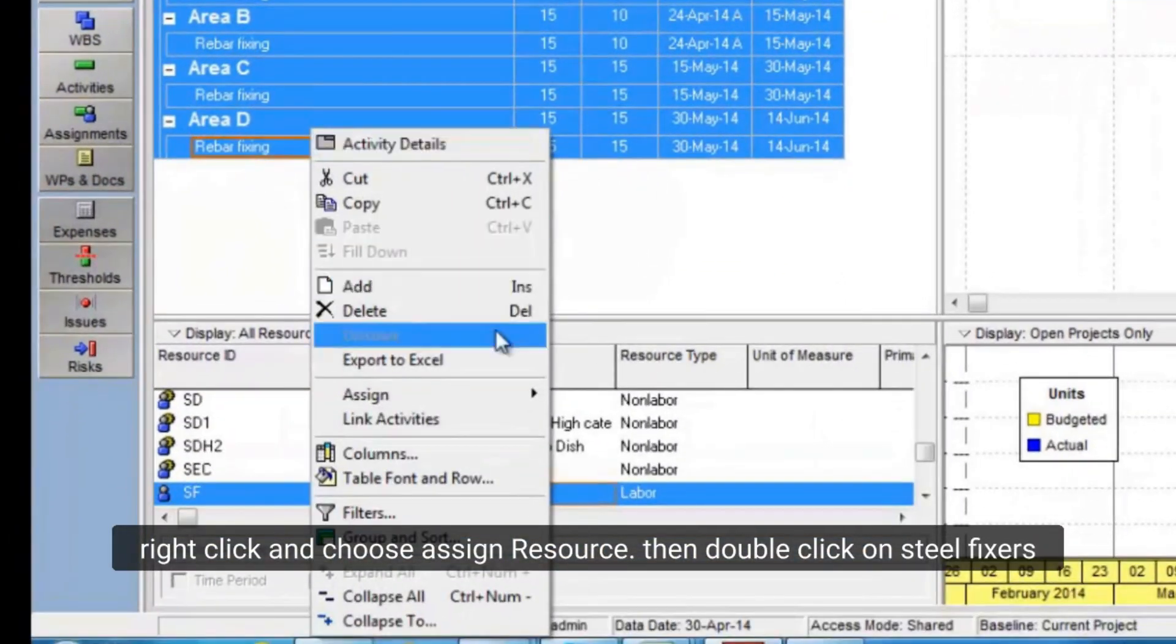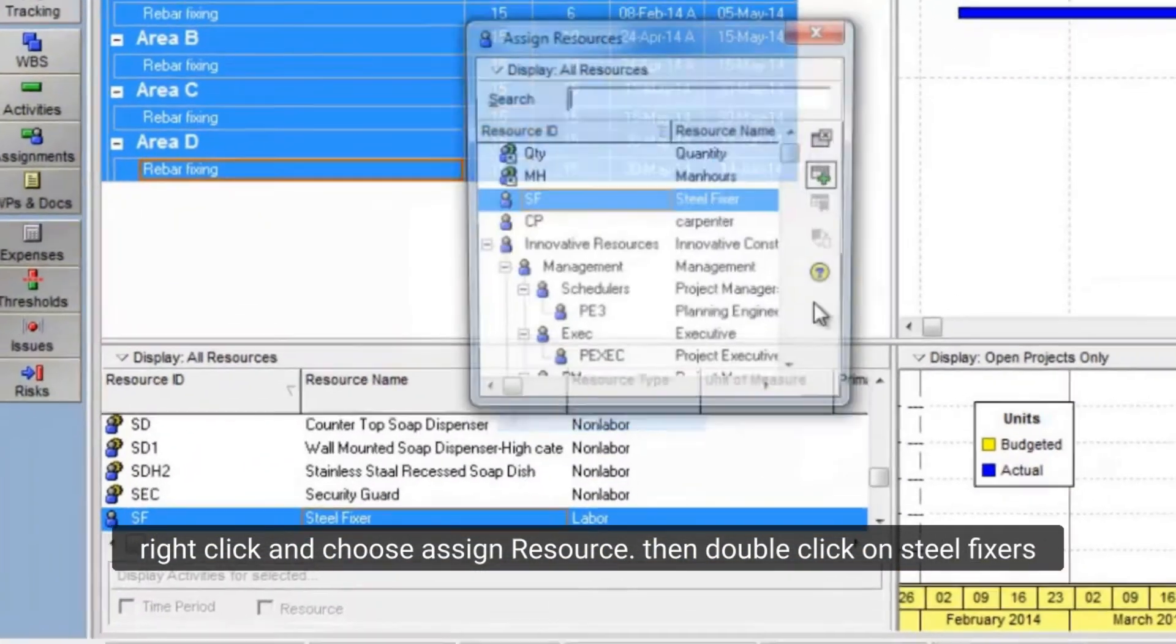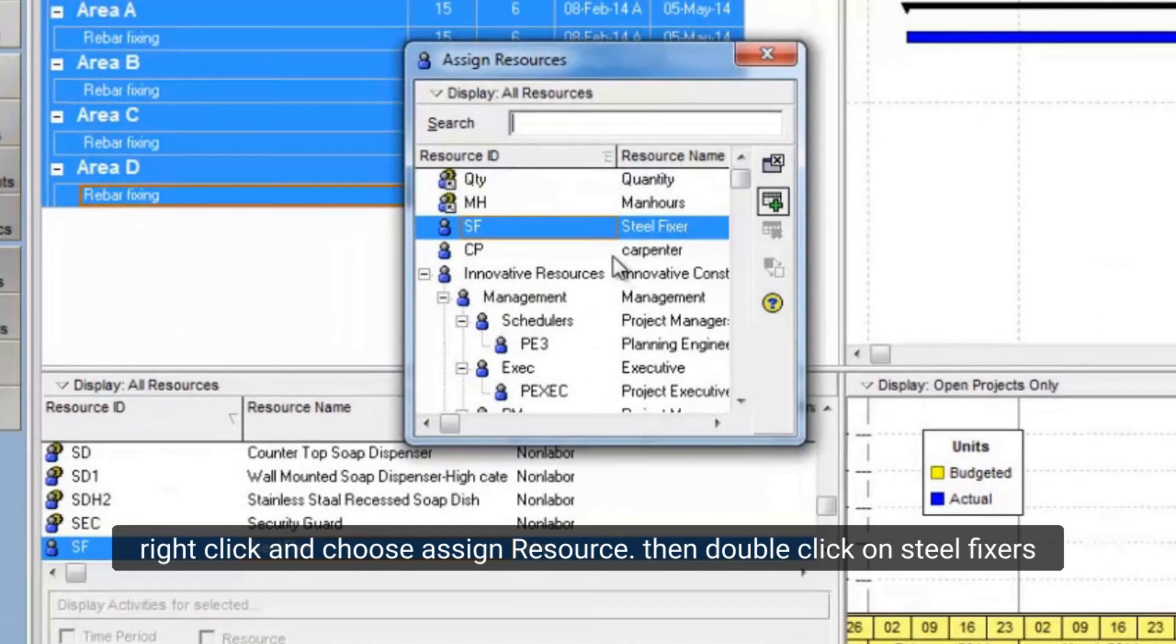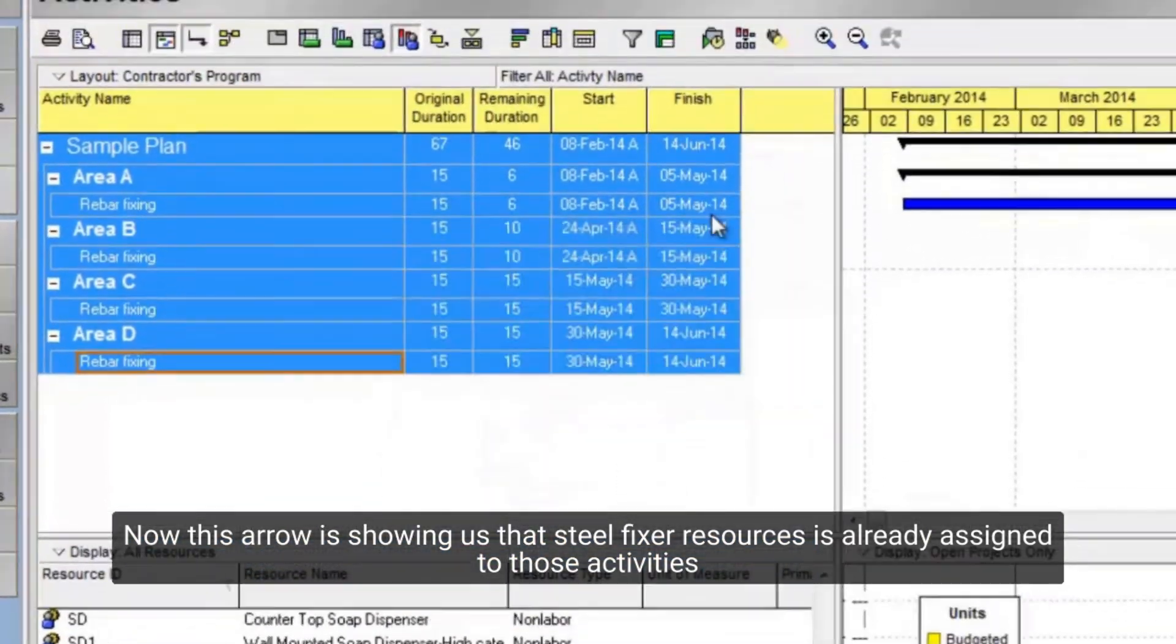Right-click and choose Assign resource. Then double-click on SteelFixers. Now this arrow is showing us that SteelFixer resources is already assigned to those activities.